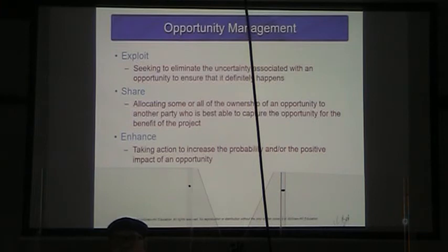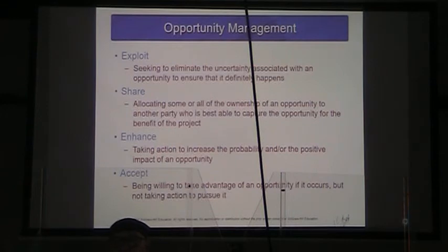We can enhance, very much like exploiting, we do everything we can to increase the probability of that positive impact of the opportunity. Okay, well, obviously that's something we want to do. And we can accept. We know this opportunity might arise.